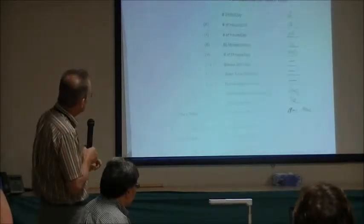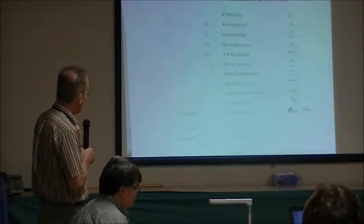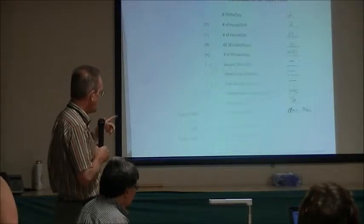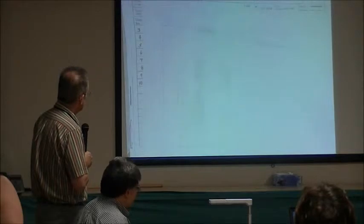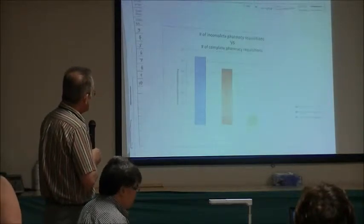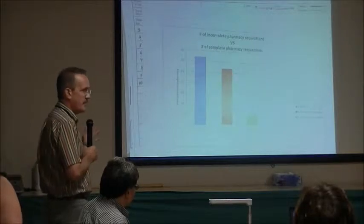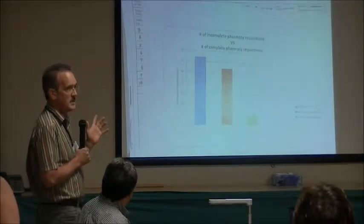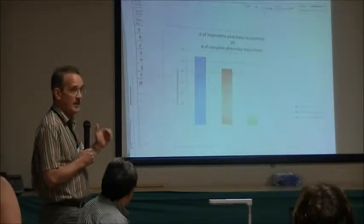So just another sheet there in terms of information, calculations for our takt time, and how we arrived at those calculations and the minutes per unit of 19 minutes and 34 seconds. We also did some defect measurement, and one of the things that we were able to identify is that 85% of the referrals coming from the physician clinics were defective in terms of missing information. So we developed some standard work around that, and we're going to be auditing it.